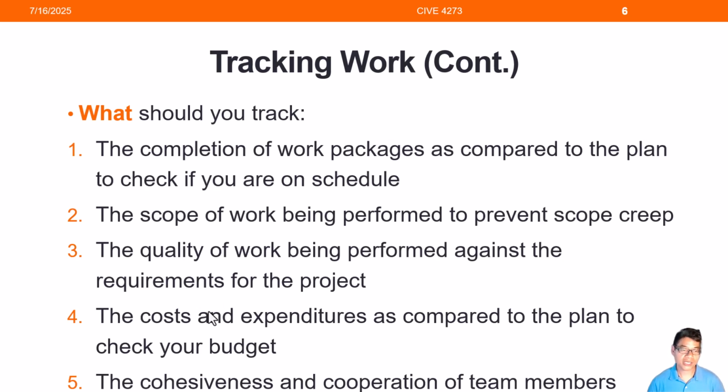And you also need to check that the quality being performed is according to a standard, according to what you originally defined. So you probably have to hire some inspectors to inspect the work and perform testing on the materials, on the finished product. You also should track the cost and expenditure. Try to compare with your original budget to see if you are deviating from your budget or not. If it is, how much you are deviating from it.